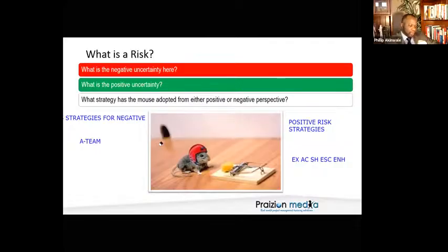So again, I would like you to go into those, read the examples they've given. It is really going to help you on the exam. You can see some of the examples that they have given. It says in avoid, an example of avoidance at the overall project level would include removal of high-risk elements of scope from the project. Where it is not possible to bring the project back within the thresholds, the project may be canceled. So that's most extreme, canceling the project, but that is an avoid strategy at the overall project level.